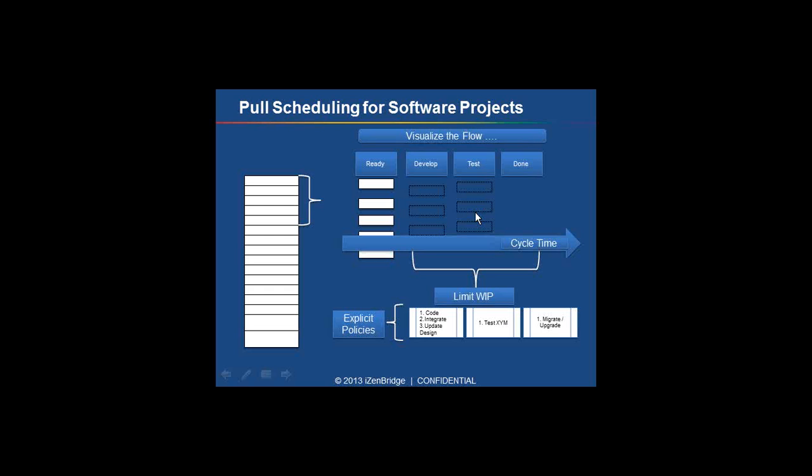Similarly, as an organization, as a team, we need to agree on how many items a development team can take in process at a given point in time. That could be slots. We can visualize them as available slots, and if you have available capacity, only then will you pull work from the previous stage. This is how we do scheduling as well as manage multiple things.